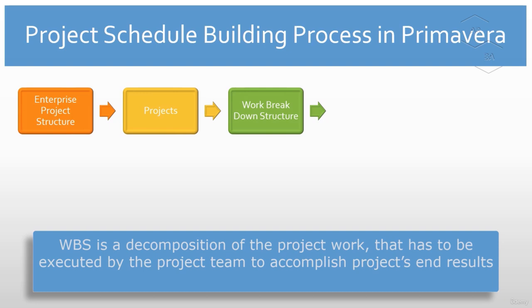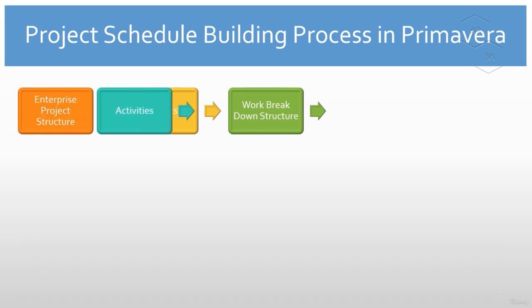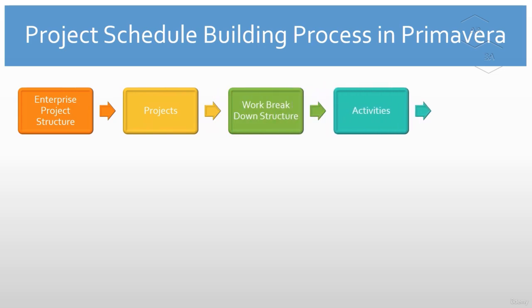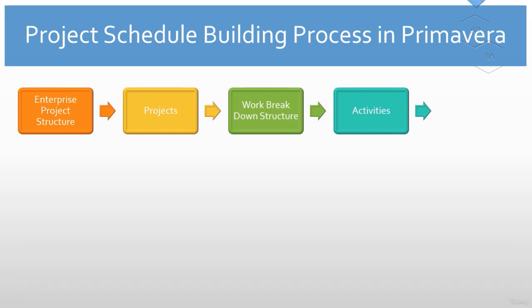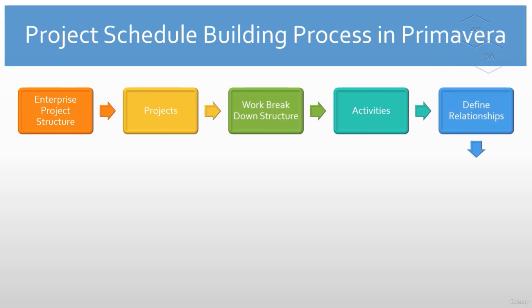The project work breakdown structure, or WBS, is created at this stage. In the next step, we create and sequence the project activities and estimate their duration under each WBS element as per our project objectives. Please note that an activity is a single unit of work which needs to be completed within its defined period of time and always has set deadlines. Next, the relationship between activities — such as finish to start, start to start, start to finish, or finish to finish — is defined.